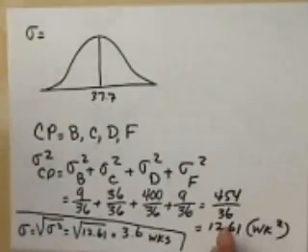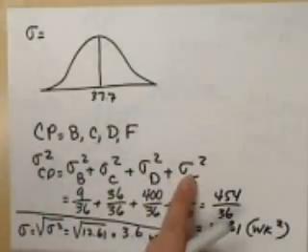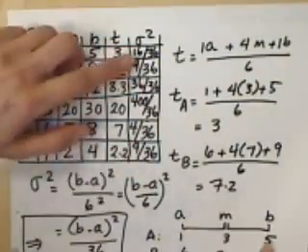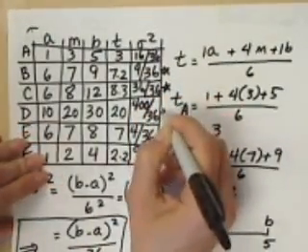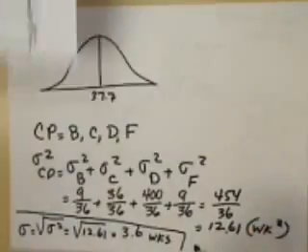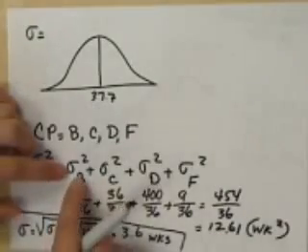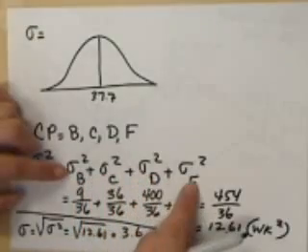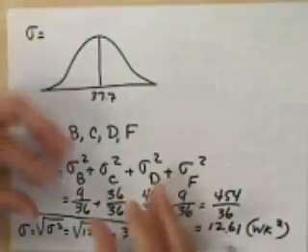Two things to consider. Number one, students often make this mistake. When they want to compute the variance, they add up all of these activities. You should not do that. You should only choose the critical activities, which in this problem they were B, C, D, and F. Point number two, sometimes students take each variance of the critical activities, take square root of them, essentially computing the standard deviation for each activity, and then they add it up.